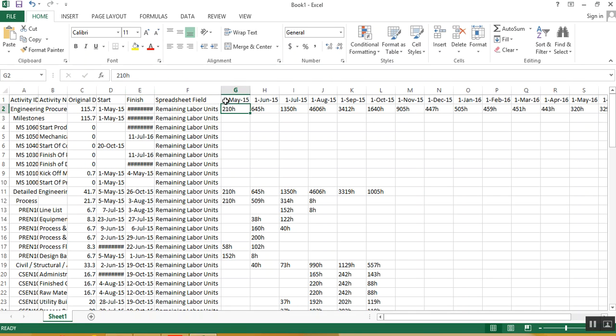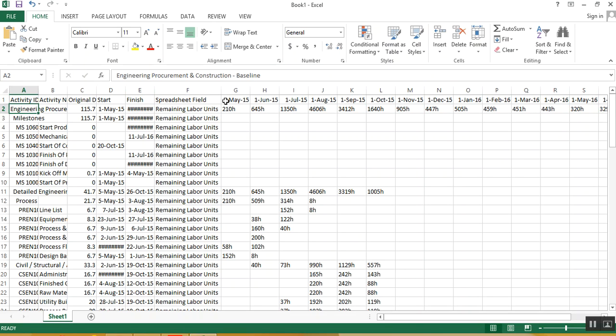So for the complete project, these are the values of remaining labors. So this is the data available and you can generate a S-curve based on this data.